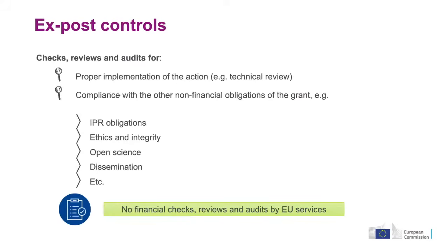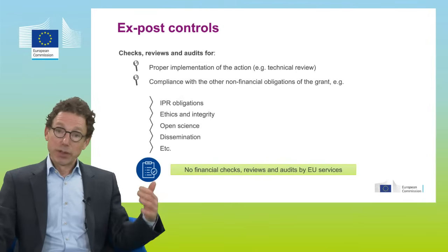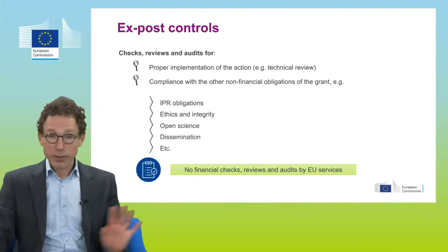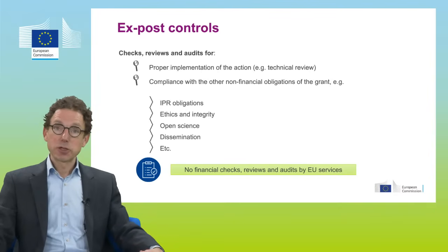Ex post controls. We are, of course, controlling and monitoring lump sum grants for all the non-financial aspects in the same way as we do all other grants. That means, in particular, the proper implementation of the action is the focus, but you also have to comply with all other non-financial obligations. And again, the follow-up during the grant is the same as for all other grants, but there are no financial checks, no financial reviews, and no audits, because there is no obligation to keep financial records and to report them in the first place.